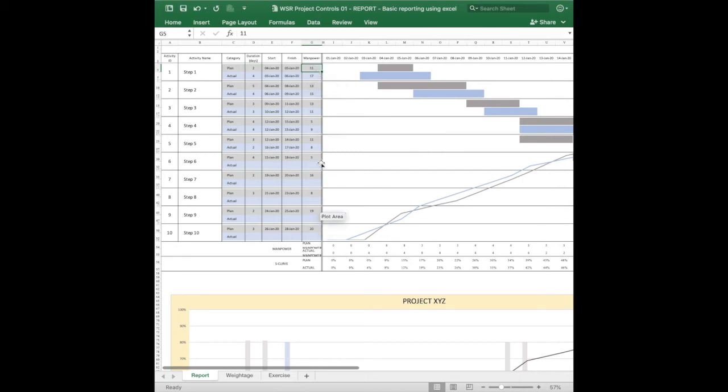So if you sum this up, this is 121 in terms of plan. So you divide 11 by 121, then you get a certain percentage, which is about 9%. Yeah. Then this 9% means that this step one is 9% of the overall of your schedule or your planning.